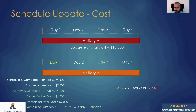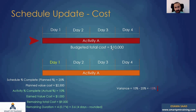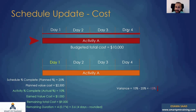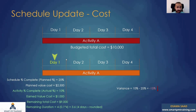We will talk about the earned value model right now. This is a very important aspect of reviewing and monitoring schedules. If I have one activity only — activity A — with a total cost of $10,000, the activity has an original duration of four days, and I want to do my update by the end of day one only.